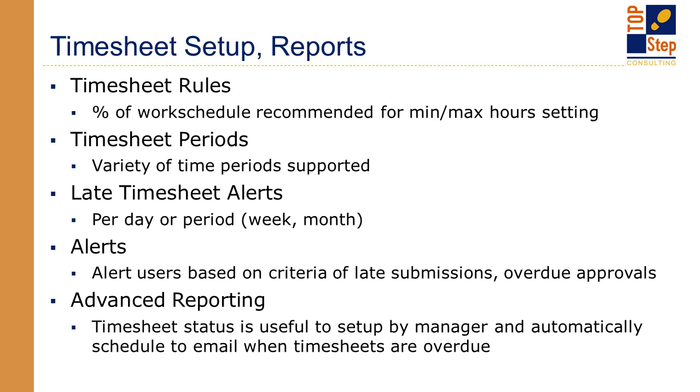And then we've also got advanced reporting. So underneath reports, there's the advanced option. Those are a lot of pre-built reports. For example, if your timesheets are due Monday at 5 o'clock, you could send one each Monday at noon as a reminder, and also provide a chart or a visual as to who has not yet submitted a timesheet. And in the advanced report, you have the option to include multiple periods.